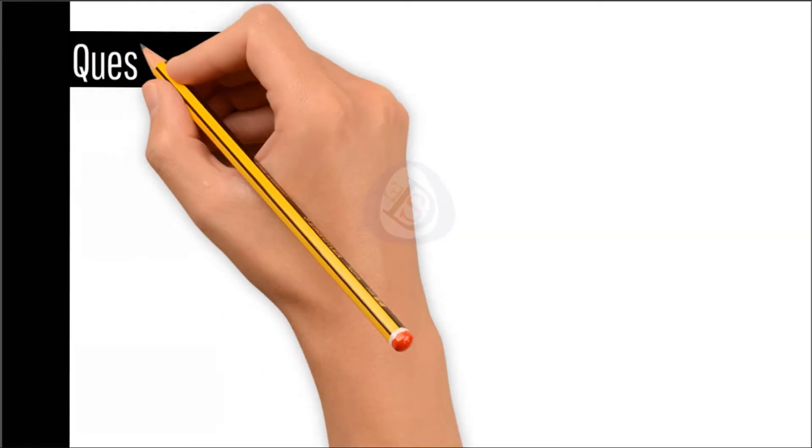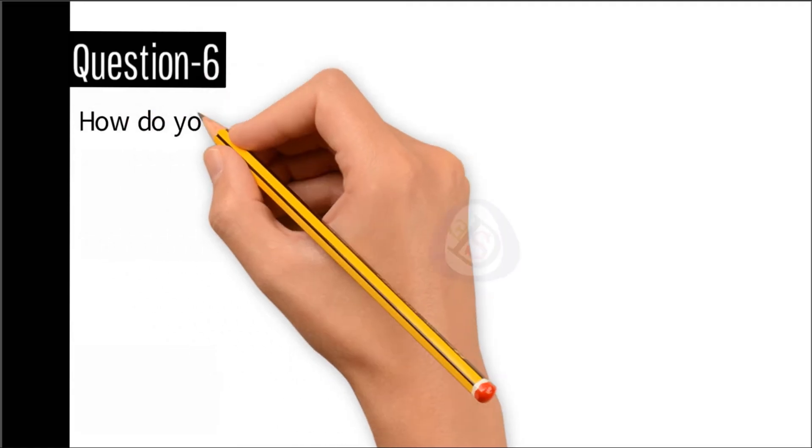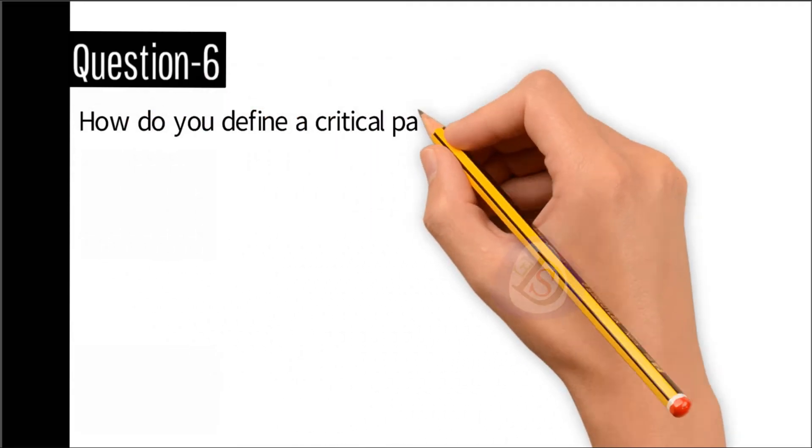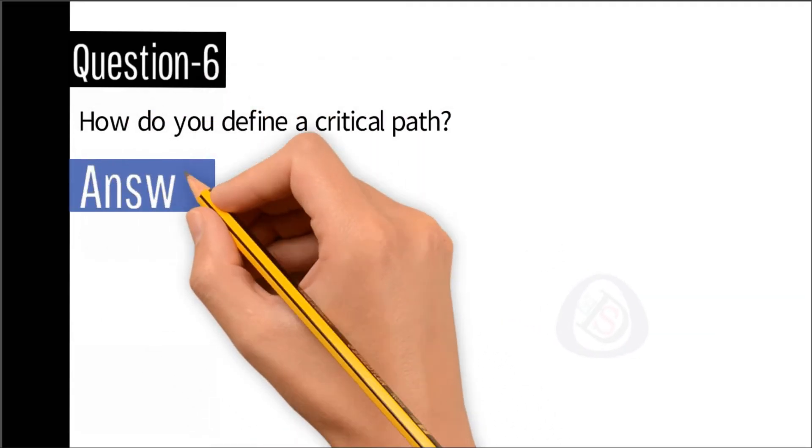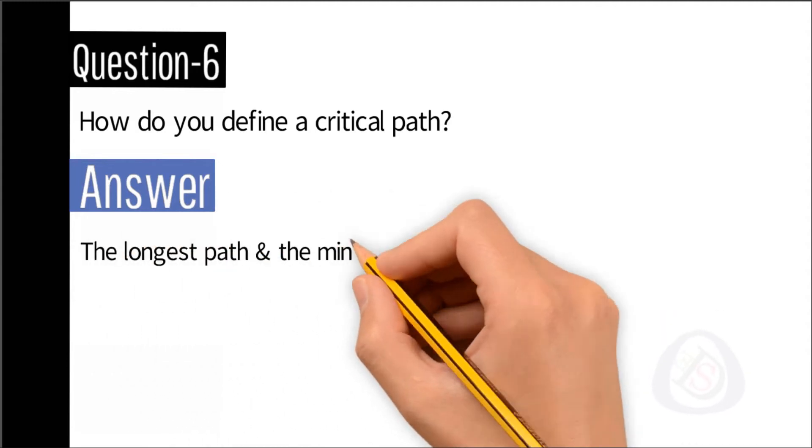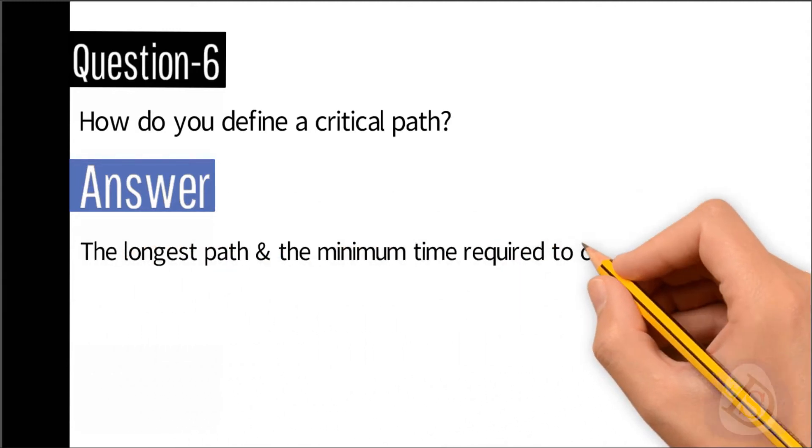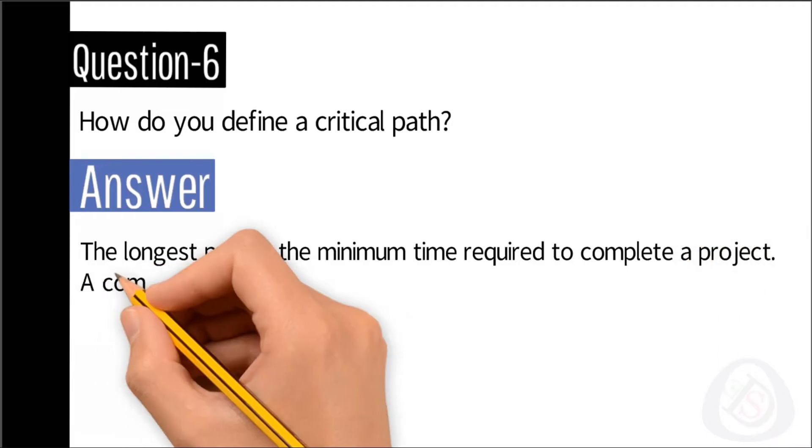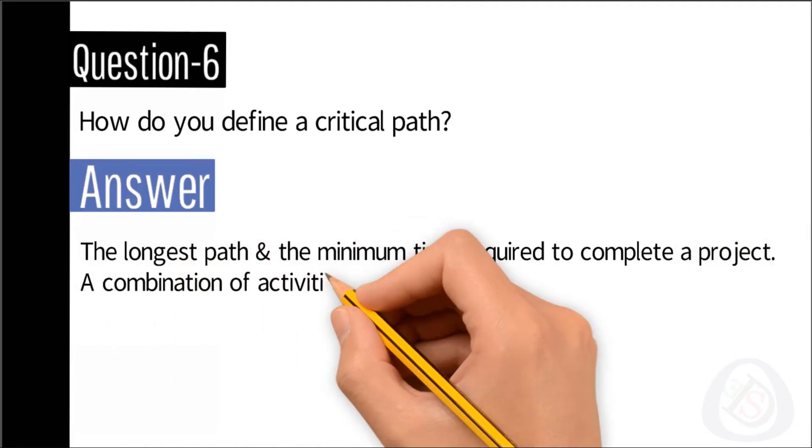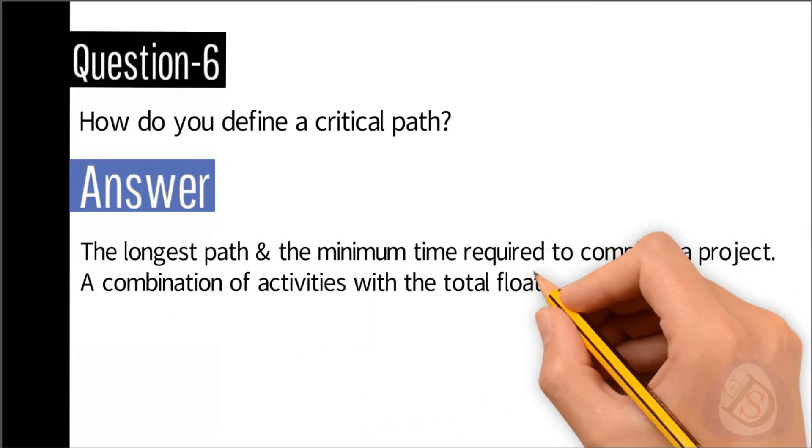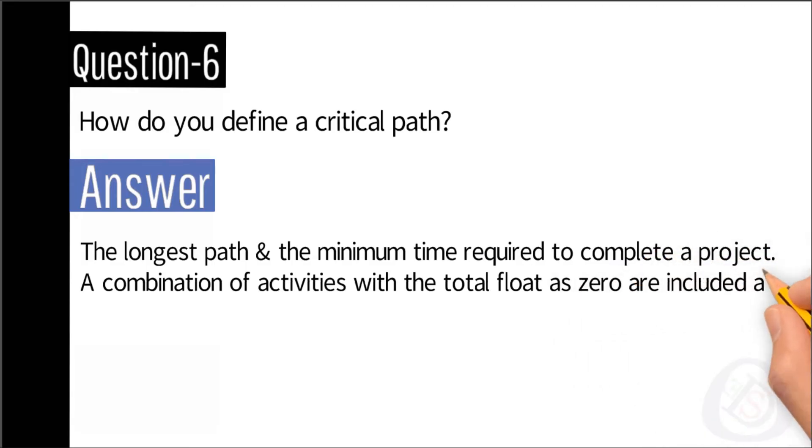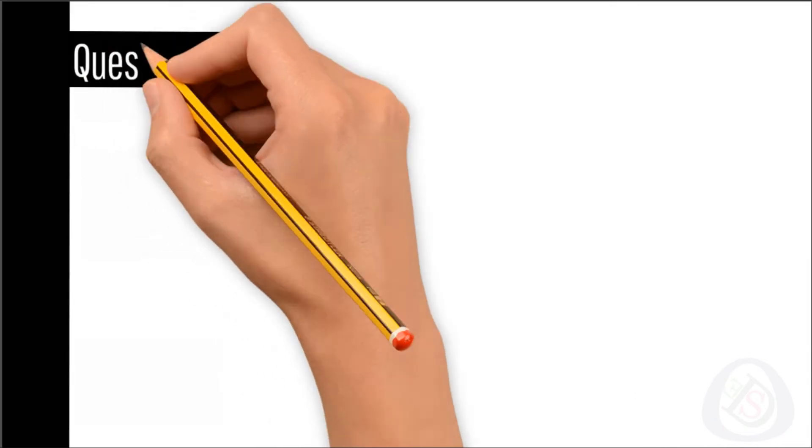Question number six: How do you define a critical path? Answer: The longest path and the minimum time required to complete a project. A combination of activities with the total float as zero are included.